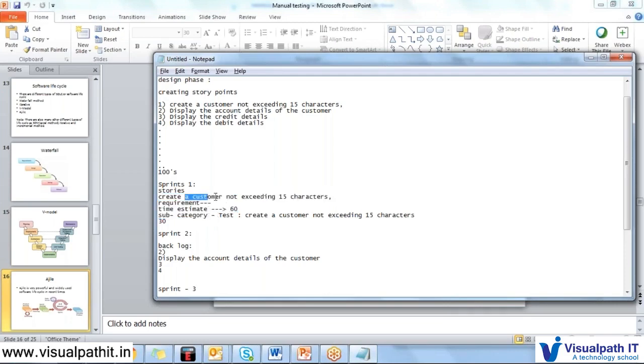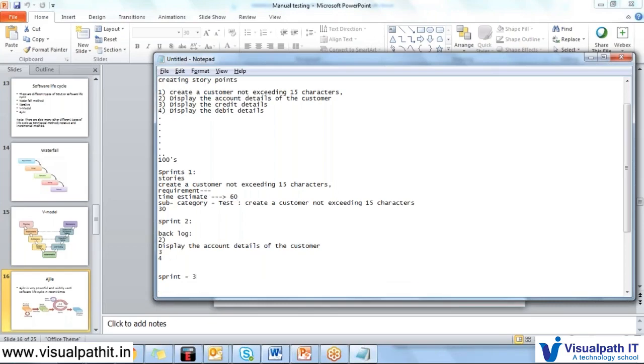So if this guy who is working is stuck for the requirement, what he does is take what is next available in this sprint. Most particularly, he cannot shift to the next sprint. In this sprint, if something is unassigned, he can take that up and start working on it until this clarification is done. So like this, the sprint will go on, sprint 3, sprint 10, and so many companies are having sprint 40, 50 also. So this is the agile methodology.